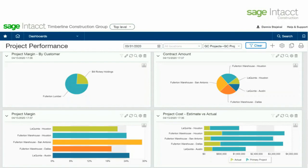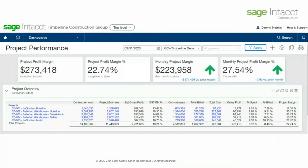The financial data can also be presented through different visualization tools like charts and graphs. Dimensions can help you more effectively analyze your project's profitability. This dashboard provides high-level visibility into the different types of numbers for your projects. It presents the revenue side via the contract amount, total billed, and percent billed columns. It presents the cost through the project estimates, commitments, total cost, and percent spent columns. And of course, your profitability position showing estimated and actual gross profit and project margin information — all of this providing a holistic view of the financial side of the project.